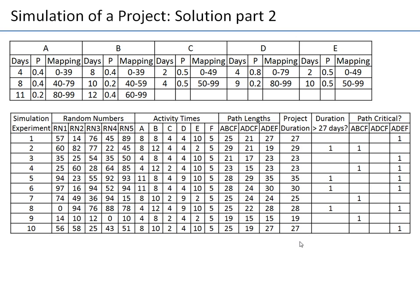To find the expected project duration, I compute the average of the project duration column across all 10 experiments, which gives 26.6 days. This is our best estimate based on those 10 experiments. Of course, with such a small number of experiments, we could also compute a 95% confidence interval.